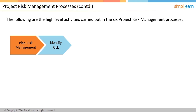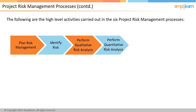The third process is perform qualitative risk analysis. This process is about prioritizing risks and ranking them as high, medium, and low for further action, with a focus on tools used to prioritize risks. The fourth process is perform quantitative risk analysis, in which you evaluate the combined effect of risks on the overall project outcome — the risks are quantified numerically. The fifth process is plan risk responses, which helps determine appropriate response strategies and actions for each individual risk and for overall project risk, integrating them into the overall project management plan.